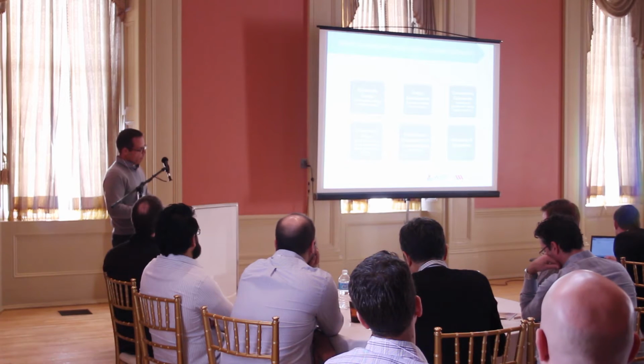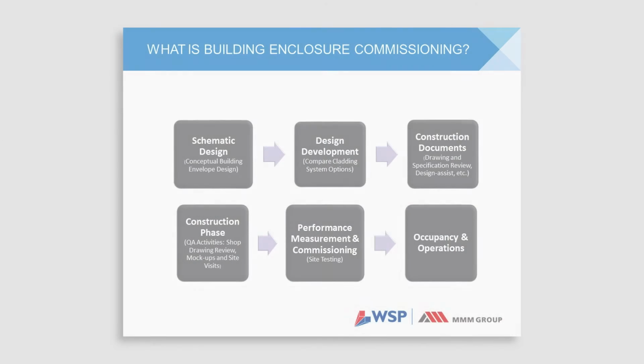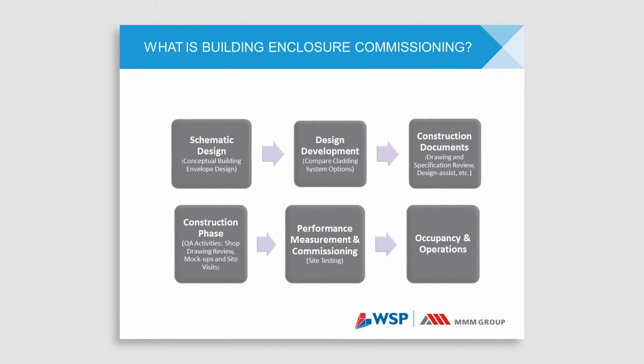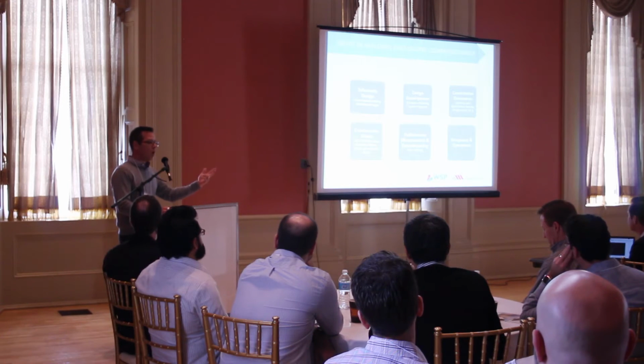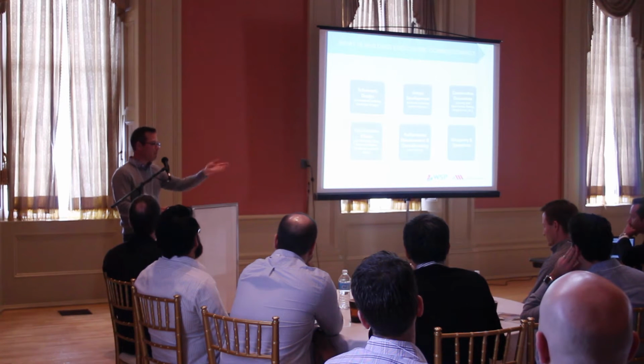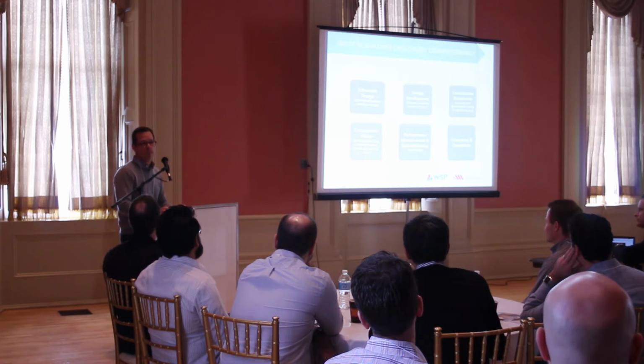Sorry, I'm going very quickly and I realize I'm running out of time. So the commissioning process, again, starts in schematic design, follows all the way through construction documents, construction phase, and occupancy and operations. So there is a follow-on process to take you all the way through to the end of construction, as well as a training process. At the end of a project, we give training sessions to building operators to say, here's the type of cladding system you have, here's the type of roof you have, here's the type of waterproofing system you have, here's the type of maintenance you need to do on each one of those systems. And here's a bunch of checklists you can use every year to say, yes, I've done all that, and you can send them to us and we'll review them. That is part of the commissioning process, training and ongoing maintenance, and that is written into the commissioning plan.